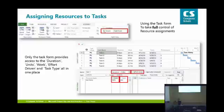So if you have more resources, the duration is decreased. But yeah, it's a project thing. You can set it up in the options so that by default tasks will become effort-driven, but you can also go in after the fact and make them effort-driven. There is actually a column in Microsoft Project called effort-driven. You can insert that column and fill down and make them effort-driven quite quickly.